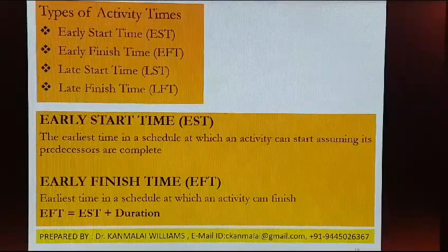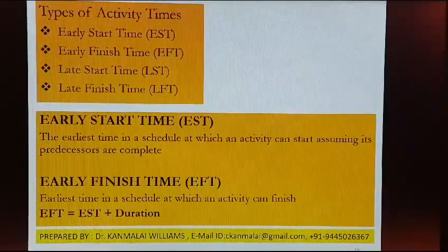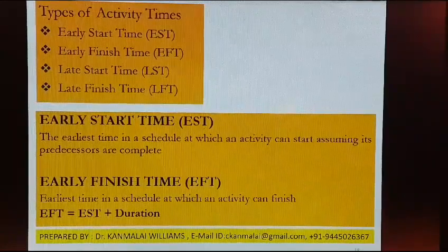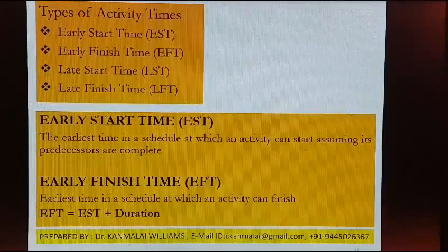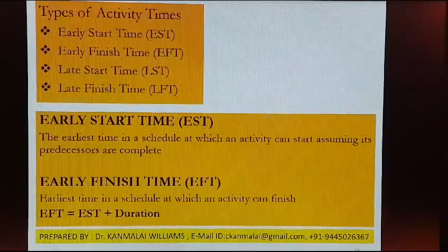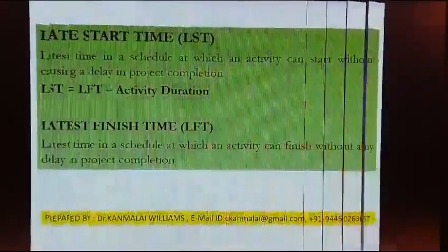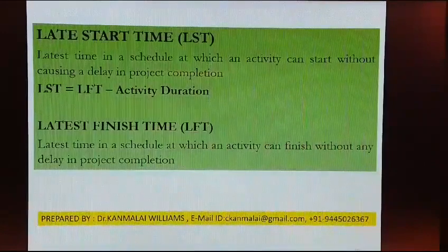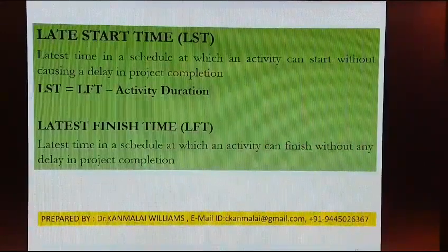Earliest finish time is the time in a schedule at which an activity can finish in a project, and it has a small formula: EFT equals EST, that is earliest start time, plus duration. Moving to the next type of activity time, we call it latest start time.